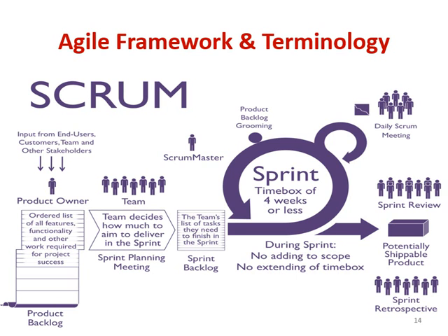And finally, we have a potentially shippable product, which is the working software. To manage all the Scrum activities, we have a daily Scrum meeting in which we have 3 questions, as I said earlier. Once we complete a sprint, we go to the sprint review. And finally, the sprint retrospective, which is an iteration retrospective and a continuous improvement process.